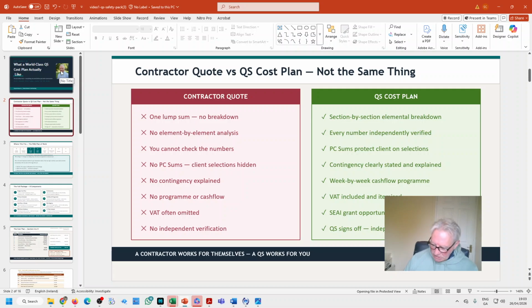And I have had cost plans that drift from tenders, but there are explanations and traceability if you stick with the same quantities of air throughout the process. If you jump to another QS, cost analysis, whatever language you want to use, then they are looking at things at a different stage of progression. So you need to keep with apples for apples, for self-care and accountability and traceability.